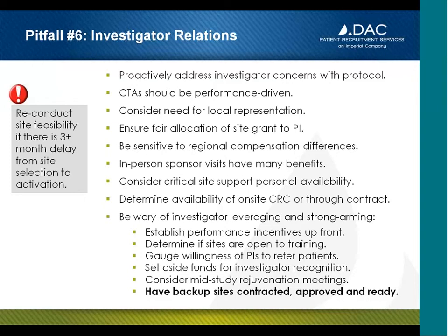And secondly, of course, have backup sites. 5 to 10% extra sites, depending on the size of your study, is probably adequate. But if you have a really small trial, consider having a few more just to have in your back pocket if for some reason sites need to be closed or if a site needs to be replaced.